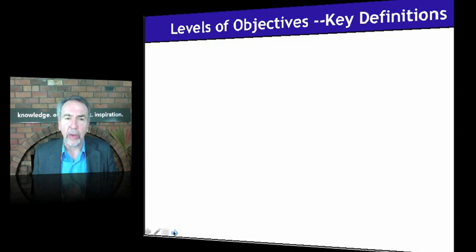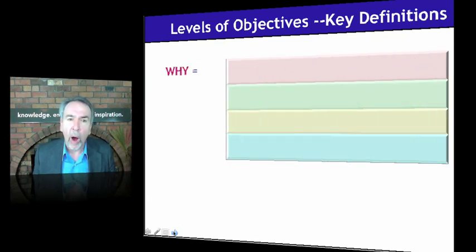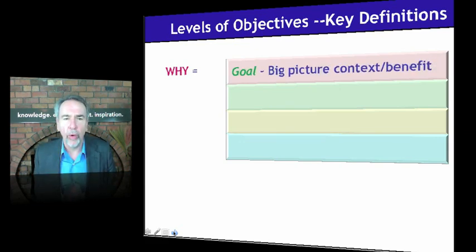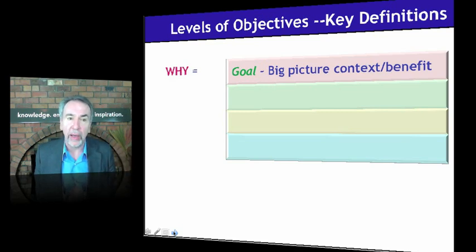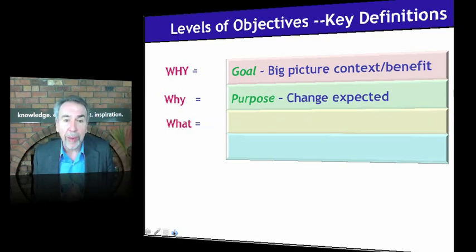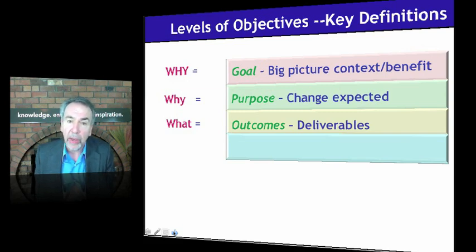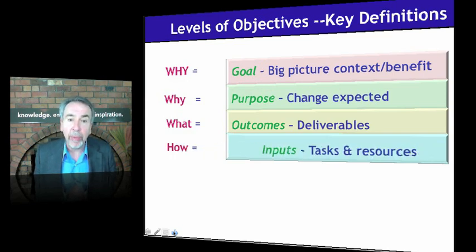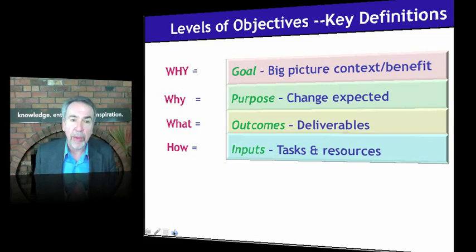Let me give you some definitions of these different levels of objectives. The big-picture why I'm going to call the goal — the big-picture context or benefit. The why beneath that I'm going to call the purpose — it's the change expected from putting the deliverables or end products in place. 'If we build it, they will come' — them coming is the purpose. The what is the outcomes: the deliverables, the specific results we can put in place given good management of our activities and resources. The how then becomes inputs — the tasks and resources to get there.